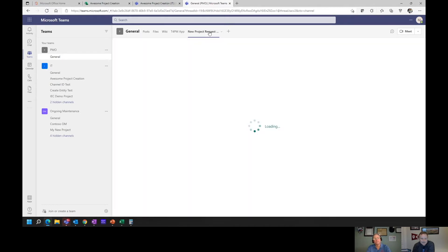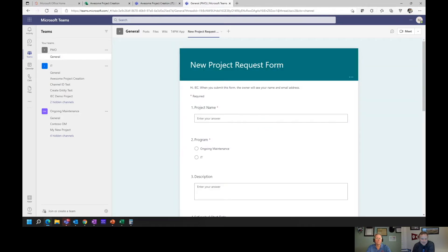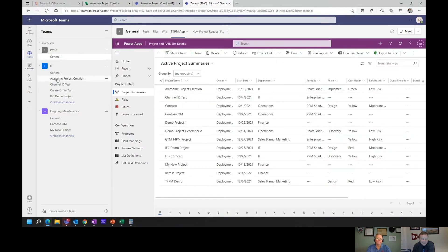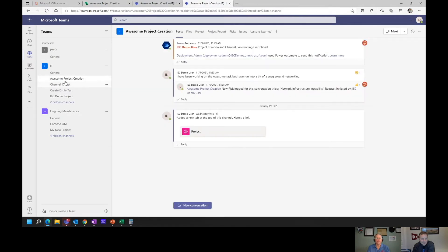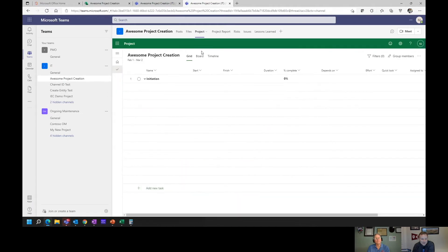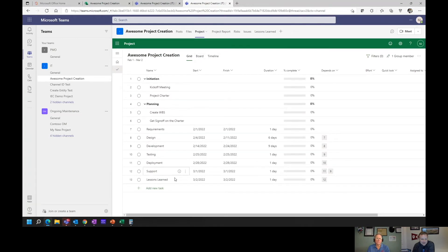Here we have a new request form. We can put the fields you want to capture for your intake process into this form and put it through a workflow. The result is that the data goes into the central app, and a channel gets created. I submitted one earlier called 'awesome project creation' — a channel was created based on the form I submitted and the approval workflow. That channel was automatically provisioned with the tabs I need, and it was able to determine whether I should be using a Project for the Web project or a Project Online project, then provision that schedule right there, ready to go.